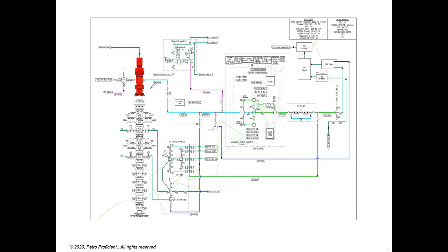The drilling operation, or whatever operation is going on at that time, will continue, and you will rig up this setup without having an interruption to the drilling setup. So what you will do is rig up this part, connect all these lines up to here, and then wait till you have an opportunity to put the bowl. The time you need to install this RCD, you need to stop the operations. But all of this rig up and pressure testing can be done offline.